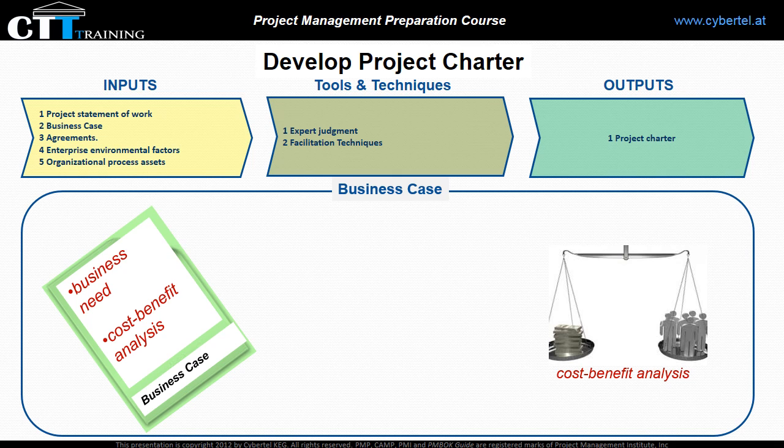When should I create a business case? The business case is created when a project should cover one of the following. Market demand. For example, a car company authorizing a project to build more fuel-efficient cars in response to gasoline shortages. Organizational need. For example, a training company authorizing a project to create a new course to increase its revenue. Customer request. For example, an electric utility authorizing a project to build a new substation to serve a new industrial park.